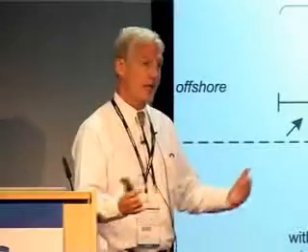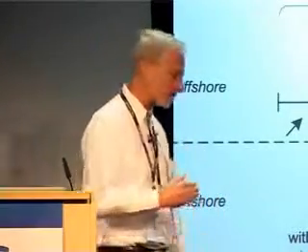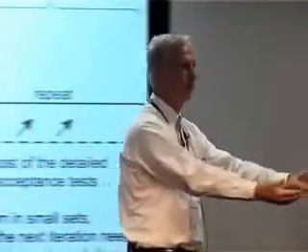Now, another problem with offshore is the requirements transfer of knowledge. In Lean, as you probably know, handoff is one of the wastes. And whenever one group creates requirements documents and hands them off to another group, we have a recipe for disaster, which is why in Scrum you don't do that, and the regular Scrum team does the requirements analysis themselves.